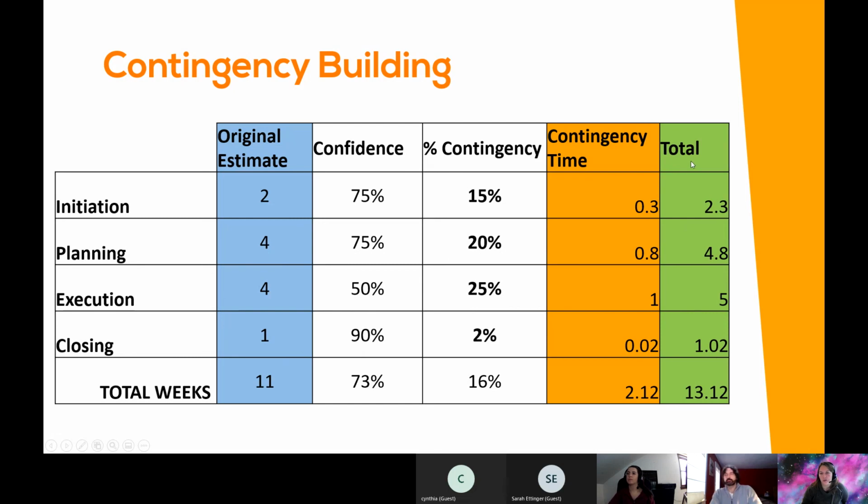What happens then is that, as humans, our new target becomes 2.3. The important thing is that you're still targeting the original duration, the original effort, but as a manager of your team, or a leader, or a budget manager, you have this contingency bucket, completely separate, that you can add if something unexpected comes up, to keep going without getting escalated. Does that idea of contingency time make sense, and the importance of keeping it separate from the original estimates?